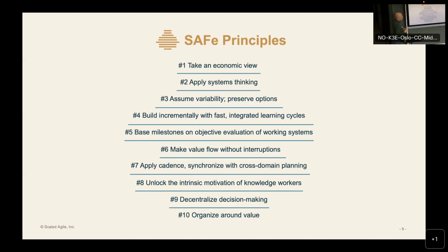On the other hand, if you choose a set-based design, you will go with more options, so you can maneuver along the way, right? But then number 1 kicks in, right? Because you can't possibly build all 4 or 5 solutions, because that wouldn't be economically feasible. So they come in tandem, and so one could actually outweigh the other depending on where you are. But those are the core principles.